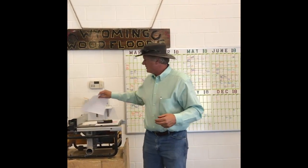With that information, it wasn't hard for me to make a recommendation that that floor was going to have to come out. There was nothing that Flood Fire Restoration Company was going to do to save that floor system. Too much water had come over it. And so with a simple little moisture meter, we were able to quickly, within a matter of 24 hours, make a decision the floor had to come out.